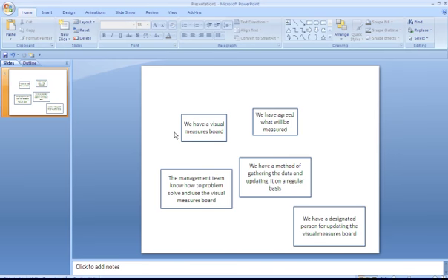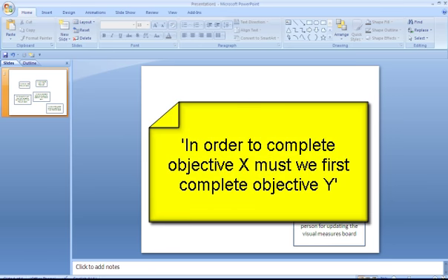And what we're now going to do is do what's called a necessity check. The necessity check is to make sure that we put the objectives, which as you can see are now written in present tense, written that way so that when we got to that point on the plan, then the objective would be achieved. What the necessity check does is it makes sure that we have the objectives in the correct order.